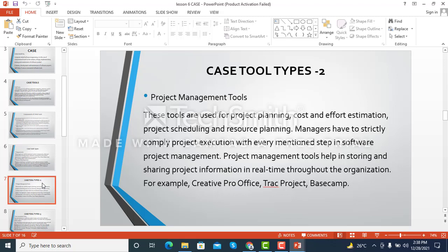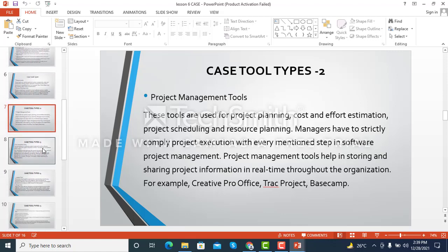For example, I can say that I want to use 1 week or 2 weeks for my conception. I want to use 3 days for my analysis phase. I want to use 7 days for my design stage, and of course the implementation could be 40 days, 30 days, 60 days, as the case may be. So there are tools for it. If you go through the internet and type in software development management tools, there are a series of such that enables you to do that.